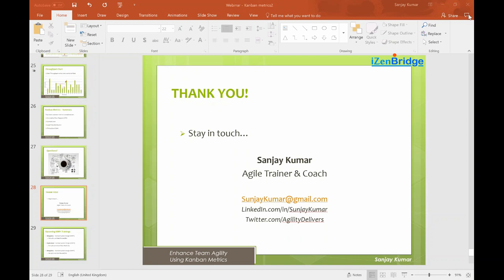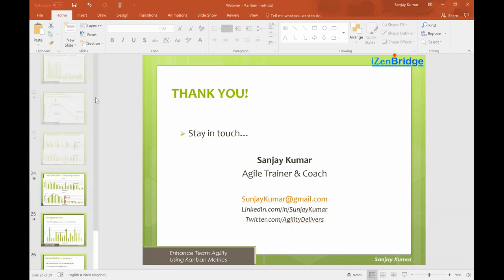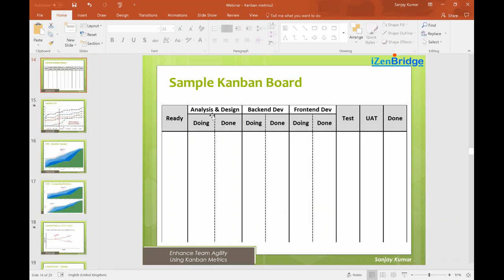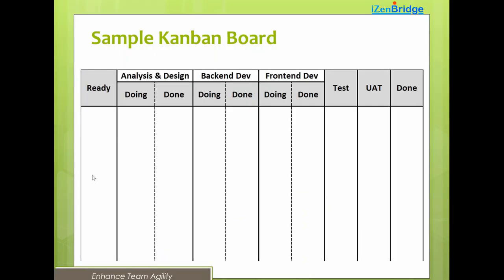Question: for which column is lead time measured on a Kanban board? Lead time covers the entire flow. Looking at the board, lead time starts when an item enters the flow — at the 'Ready' column — and ends when the item exits on the right side. You take the difference between the end time and the start time to calculate lead time.